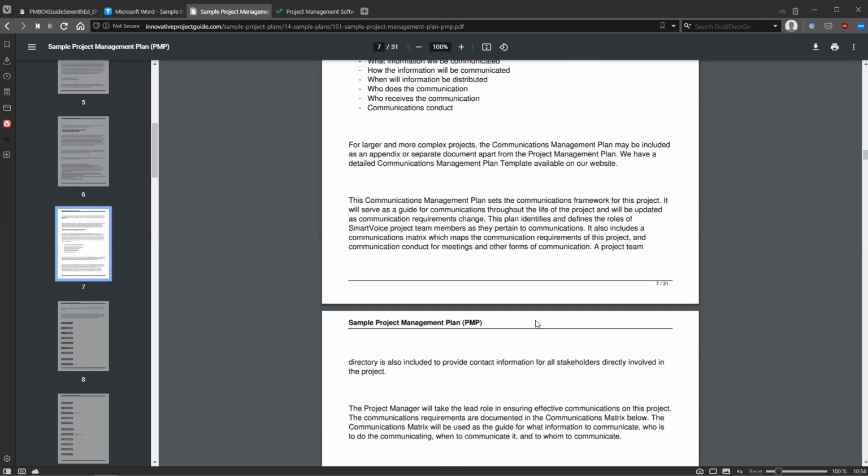Project management plan essentially has two sets of data, personally, I think. First is regular communications and regular meetings with certain cadence, certain schedule. You can capture it early on. I usually do it, let's say, have a project meeting, have a status update communication, have, let's say, a sponsor or executive sponsor meeting.